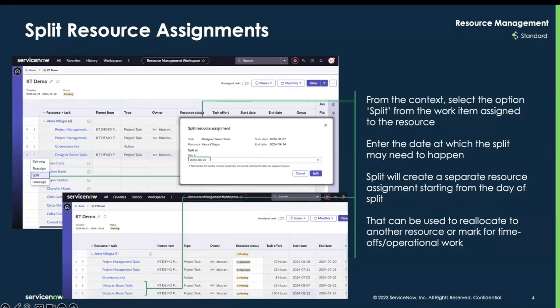The first update is split resource assignments. This allows users to allocate work to specific time slots, helping optimize resource utilization. Within the resource management workspace, when you drill into a user and select a resource assignment that's been created, all you have to do is select Split within the three dots menu, then hit Split Resource Assignment and enter the date at which the split will need to happen.